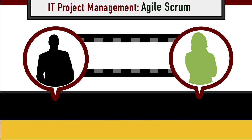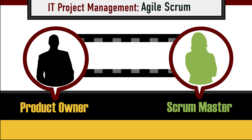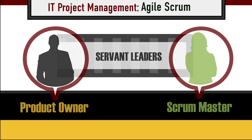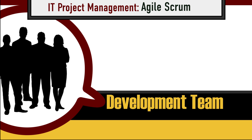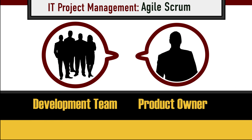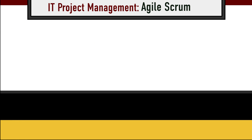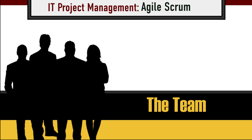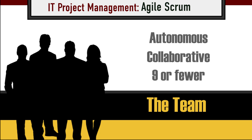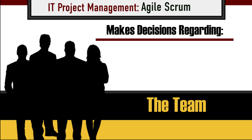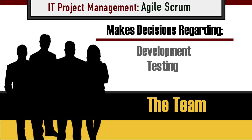Remember that both the Product Owner and the Scrum Master are servant leaders. They're available to help, but they don't direct or dictate the work. The Development Team is responsible for completing the work. They collaborate with the Product Owner during each sprint to deliver a working prototype. The team, usually made up of nine or fewer long-term members, should be collaborative and autonomous. The team makes their own decisions about development, testing, and production.